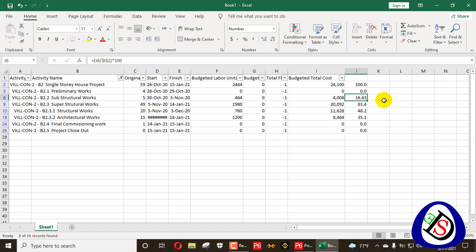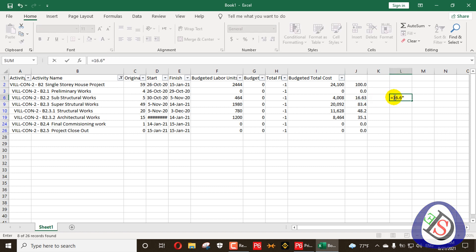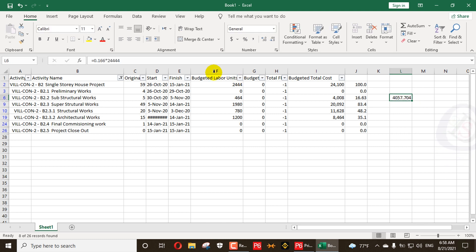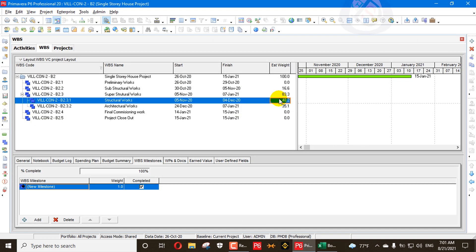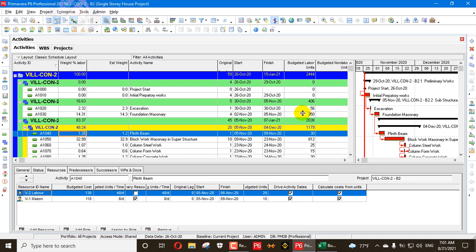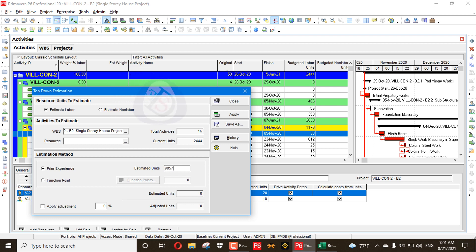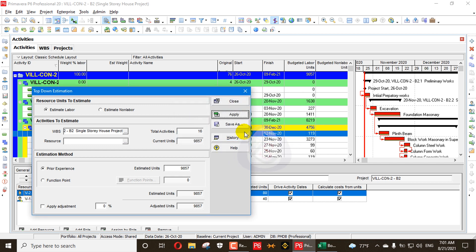For example, 16.6% of 2,444 equals approximately 406 units. The issue is I haven't used the fully accurate percentage value. The conclusion is: when putting weightages at the WBS stage, only one decimal is allowed, so calculations won't be perfectly precise. But you can get a near-precise value. If you go to estimate weightages and enter any value — say 9, 8, 5, 7 — and apply, it will be applied for the whole project.